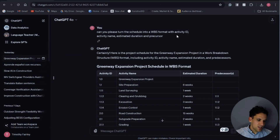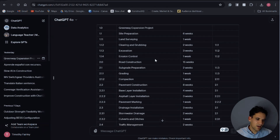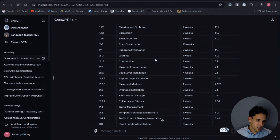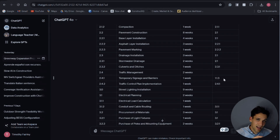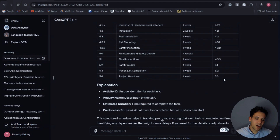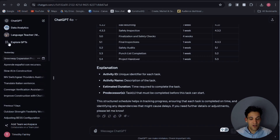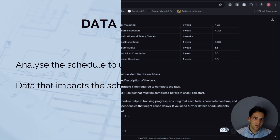Here I've asked ChatGPT to turn the schedule into work breakdown structure format with activity ID and so on. It's taken our example — the gateway expansion project — and it's got an activity code, an activity task, a duration, and a predecessor for every activity. It's listed all the tasks we need to complete the project, estimated durations, and put in a predecessor activity for each one.